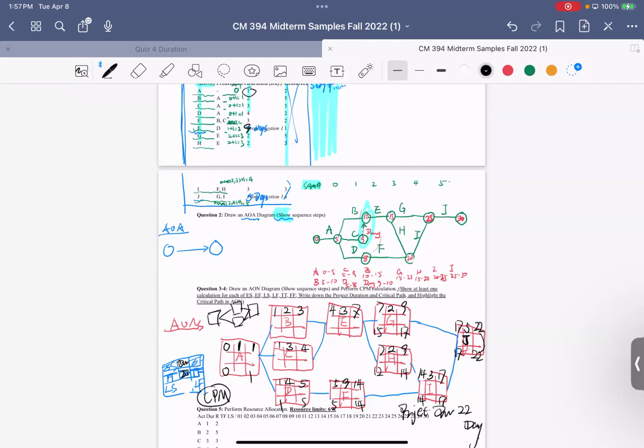And compare, take the one which is smaller. You have 15 and you have 12, so you will get a 12 here. 12, you get a 9. And the 9, you minus 2, you get a 7. So any question for the backward pass? No?